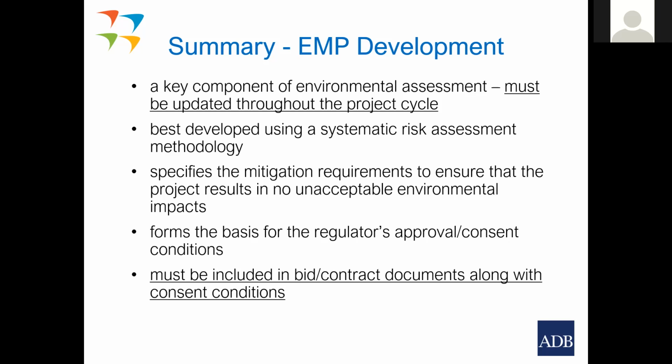But for those who are not that experienced, or even for experienced people, going through that risk assessment process is pretty foolproof. If you put each of the activities down and then systematically look at the likelihood and consequences, you're not going to miss anything drastic. You're going to identify the key risks. So it's useful in that respect.